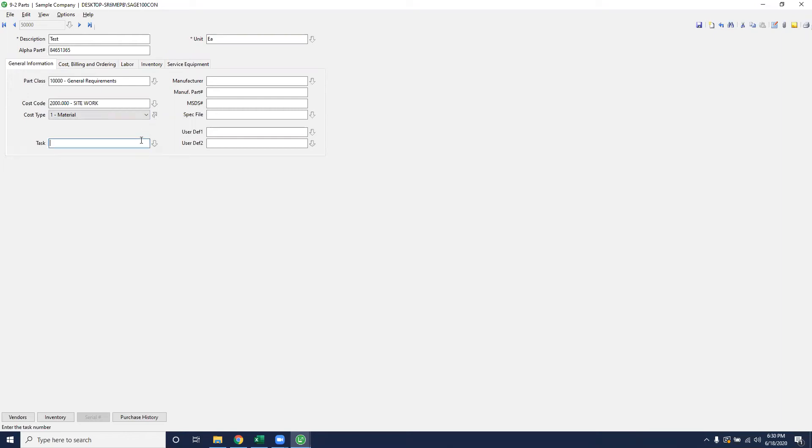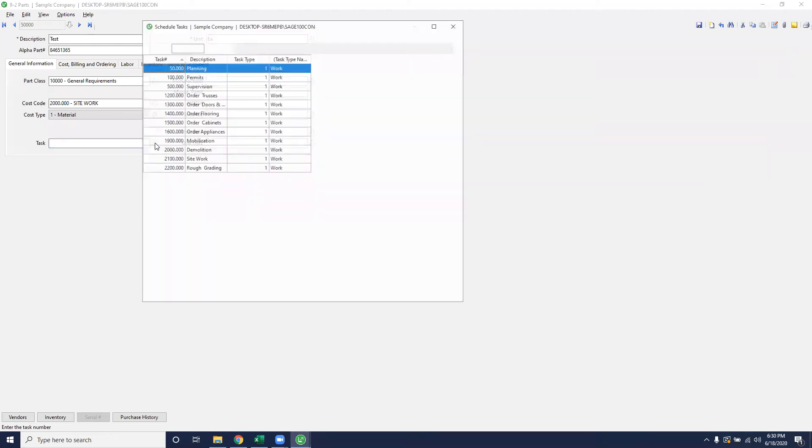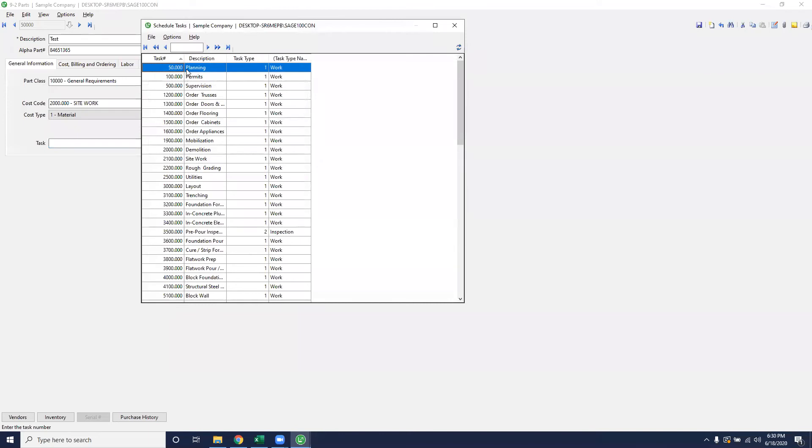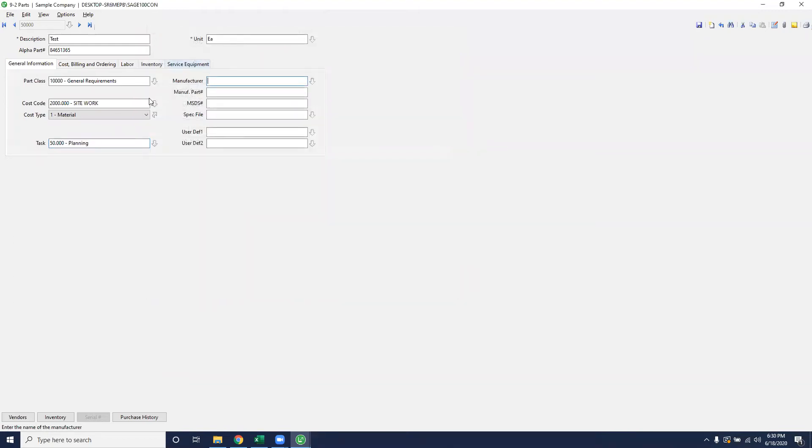The next item is the task bar. That is strictly for scheduling on our Gantt chart. You'll want to put a task that is associated to that part. Depending on the tasks that are already inputted in the system, you'll want to select which one is applicable. So if I wanted to put this as my planning task, this will be the first task that goes on my Gantt from this part. If you don't have tasks already set up in the system, that'll be another spot that will need to be entered before you can proceed with this. However, anything down here in the general information tab is not needed in order to save the record. It's just strictly additional information.